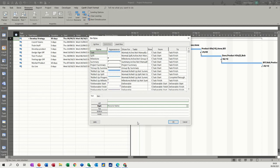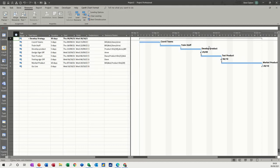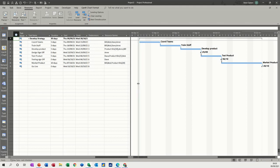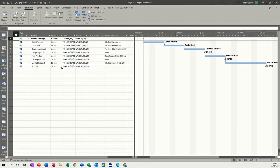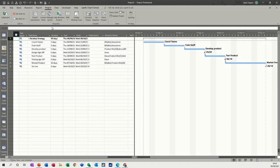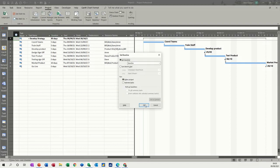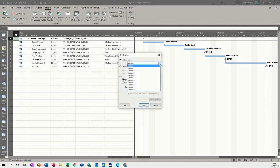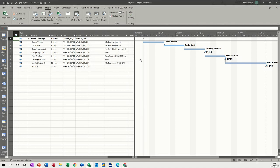Now I need to save a baseline. Up to Project, Set Baseline, Set Baseline. You've got up to 11 baselines, but I just want the first one. When you're once you've set a baseline, you should really go and use the tracking Gantt.